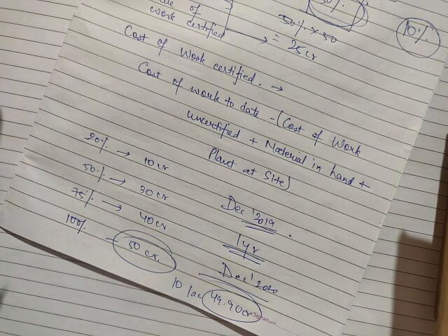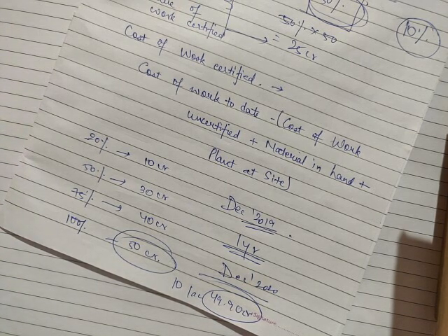In some contracts, the contractor might have to deposit some security money from his own pocket before starting the contract. This is known as earnest money. If the contract is completed in accordance with the terms and conditions, then the contractee will return the entire earnest money paid by the contractor. If there are certain defects, then he will keep it with himself.